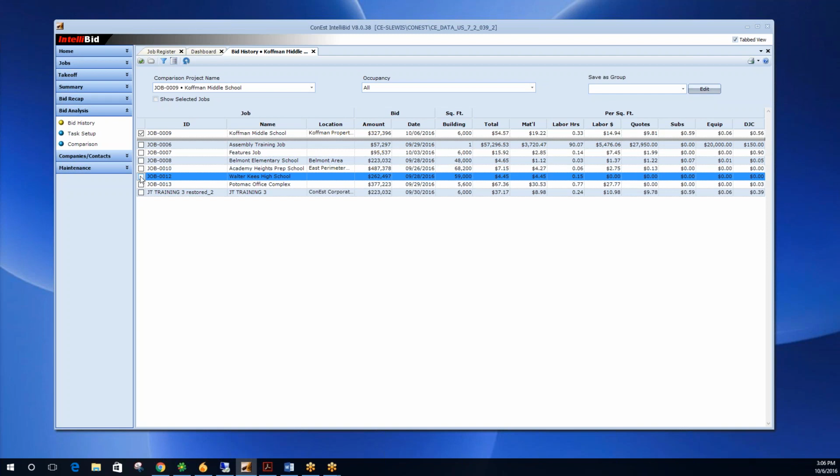Or maybe a contractor calls someone that you worked with before and they want a price. You can give them a ballpark figure because you don't have time to bid it. So I could pull up 2 or 3 similar jobs, and maybe add 5–10% onto that, and I should be somewhere in that number. So we'll walk through this a bit more.